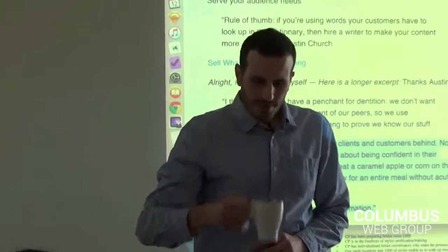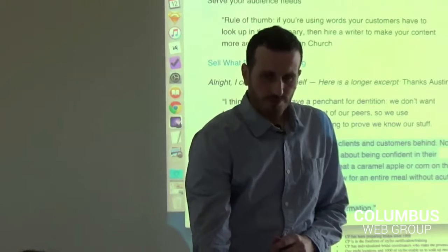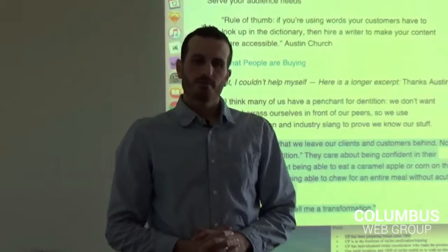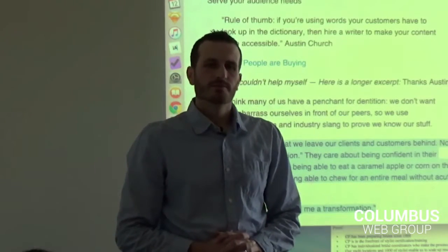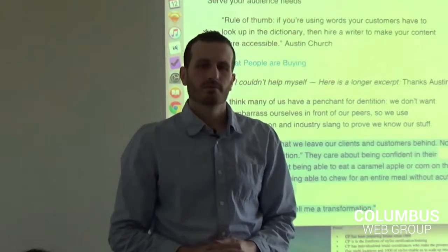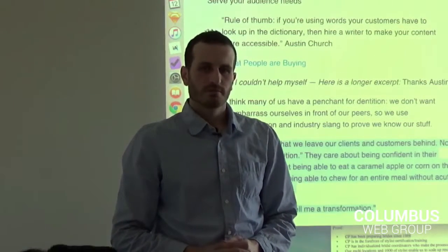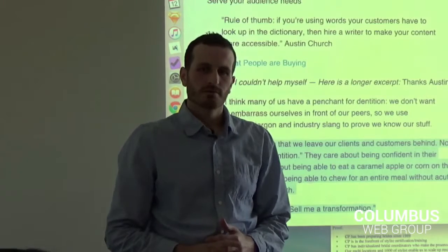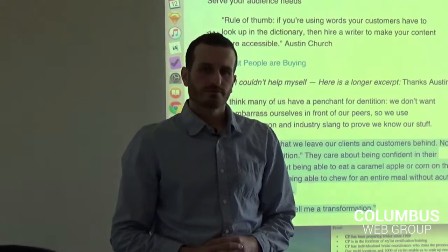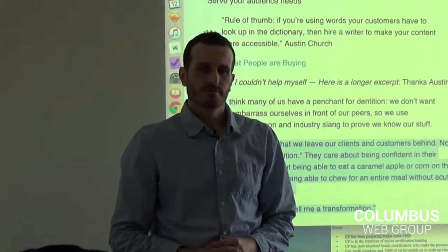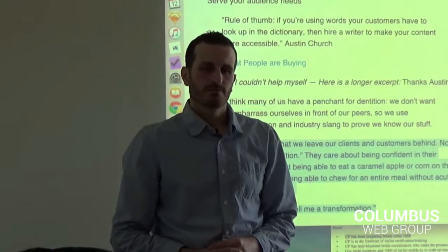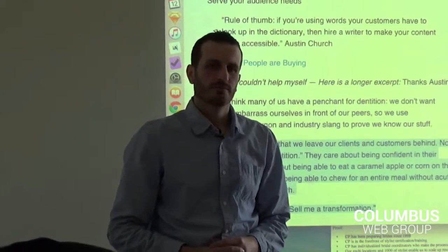One way we've tried to solve that is by doing a project assessment before we actually sign the bid contract. So we do a couple workshops and then we define those deliverables really explicitly. Like, here's exactly what we delivered based on the assessment. And they were involved in a workshop and helping define those things. So then in the middle of the project, they're not asking for things that they don't have resources for.